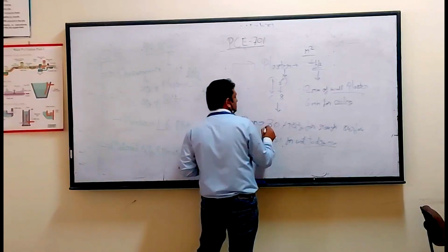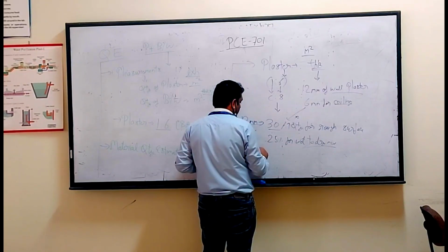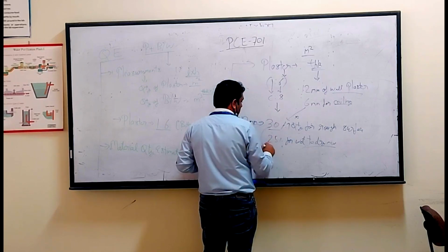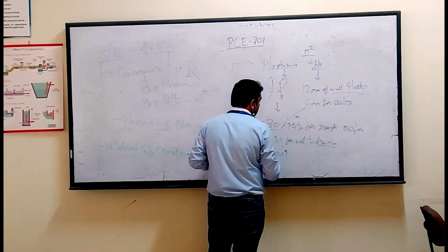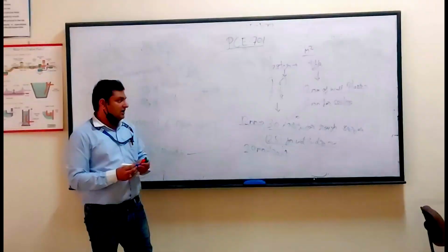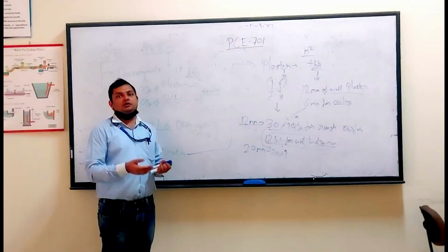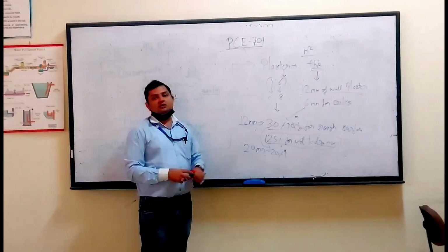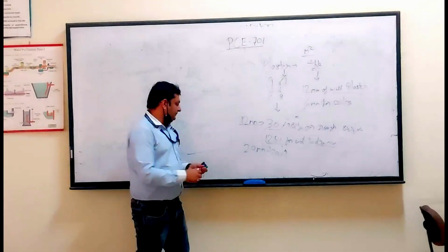For 6 mm, this is not required. If the plaster were 20 mm, this value would come down to 20%. The 25% will remain constant for all plaster thicknesses. It is for the dry volume: to calculate how much dry mass you require, 25% will be added. Fine. This is the assumption which will be taken for the plaster.